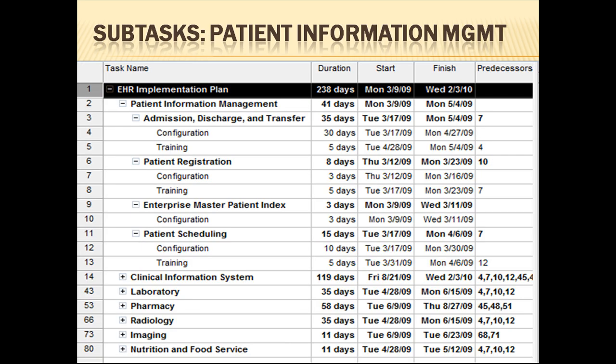Each of the tasks mentioned in the previous slide have certain subtasks that must be completed. Each of these subtasks has a configuration component and usually a training component as well, but not always. One important thing to note is that training for any of the subtasks can only begin when the configuration has been completed. However, more than one training can occur simultaneously. Whenever the start of one task is dependent on another, Microsoft Project makes it easy to link this dependency by inputting the row number of that task in the predecessor column, as you can see in the table.